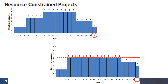Resource constraint projects have a hard limitation on the availability of resources. In this particular example, you can see in the bottom graph that our hard threshold for resource availability is five units. And to meet that requirement, we need to extend the project duration from 20 days in the original project to 23.